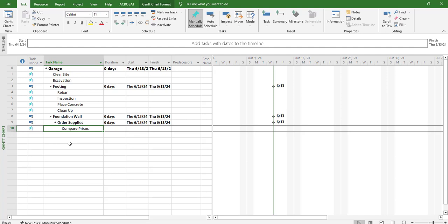As you can imagine, some tasks take a couple of days, so 2 weeks wouldn't fit into that. Other tasks, if we were erecting steel or something like that, could take a month. And so maybe we don't need to break it down that much. So it's a little bit of an art there. But again, this is how we do our tasks, subtasks, and sub-subtasks.